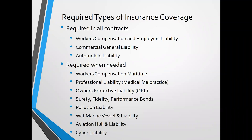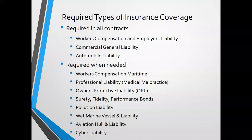Required coverages in all contracts — what we call the Holy Trinity — are workers' compensation and employers' liability, commercial general liability, and automobile liability. Outside of that, we look at what the contract is for to determine what specialty coverages may be needed, such as professional liability or cyber liability. Workers' compensation maritime applies any time we're dealing with work on or near water. Owners' protective liability typically comes up with construction or infrastructure projects.